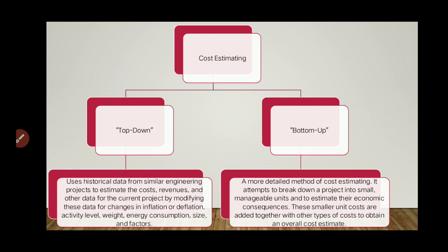Kapag bottom-up naman, more detailed method siya. It attempts to break down a project into small manageable units and to estimate their economic consequences. So, from the very specific scope of work, inaalam mo kung ilan yung gastos.